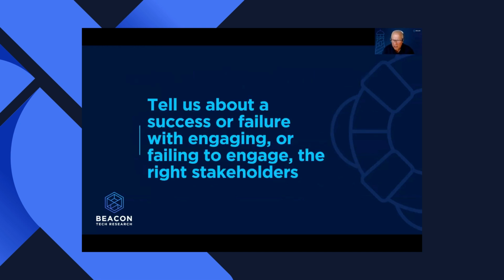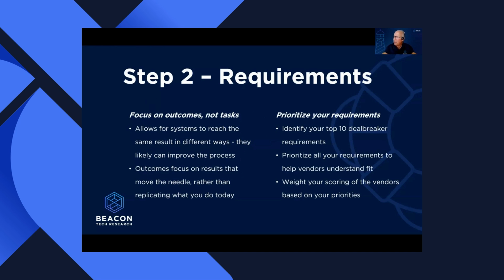And let me just add to that, Vanessa, real quick. When you weight your scoring, you might be inclined to just mark them as must-haves and nice-to-haves. I recommend you dive down within the nice-to-haves and create priorities within that, from not required but really, really want this, to very nice to have, to plain nice to have, and anything below that is probably not going to be paid attention to. So just stick that in your back pocket for when you're defining your nice-to-haves. Go ahead, Vanessa.